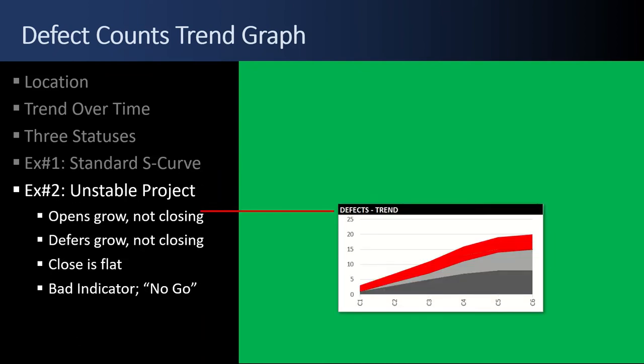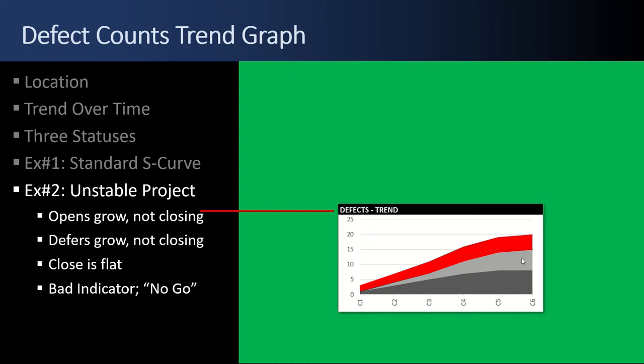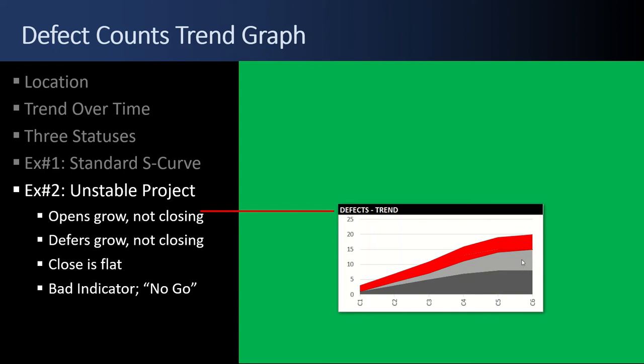Example number two, this is an unstable project. I look at this, the reds, the opens, they just keep on growing. They never close. They're just getting bigger and bigger. The defers are growing and the closes are flattening out. That is not good. What is going on here? Are they taking lots of defects and just playing games with them, throwing them deferred? This project is nowhere near ready to go. You need to stabilize it and stop, stop adding features and just focus on getting the reds back down to zero.